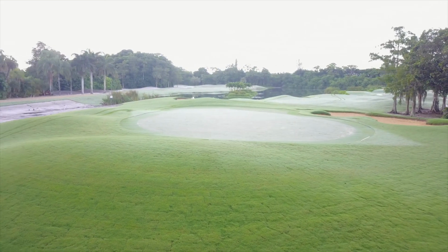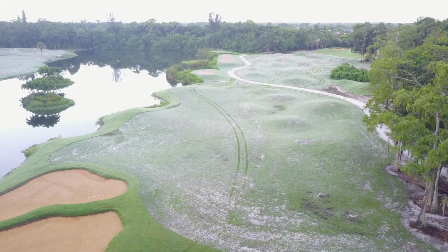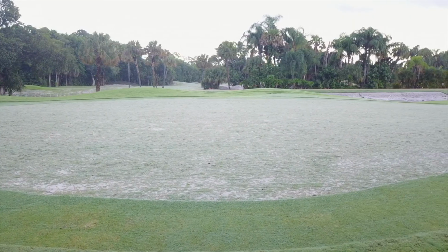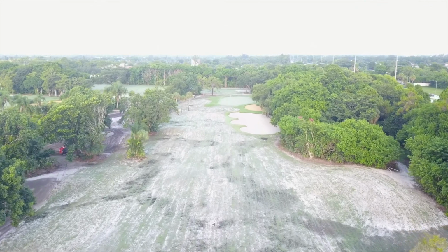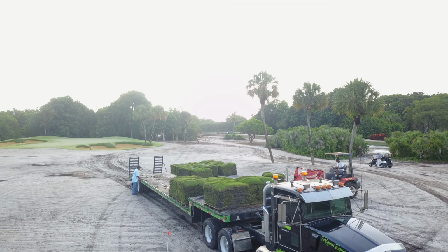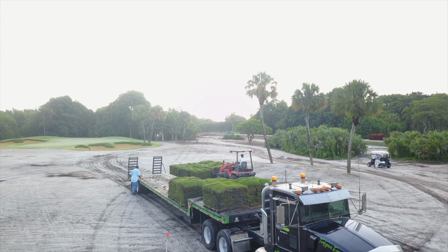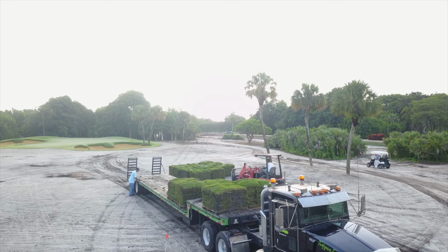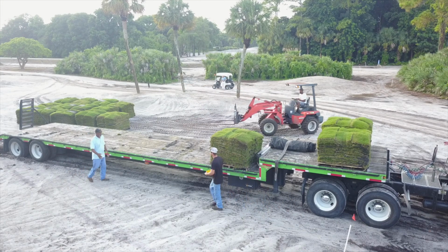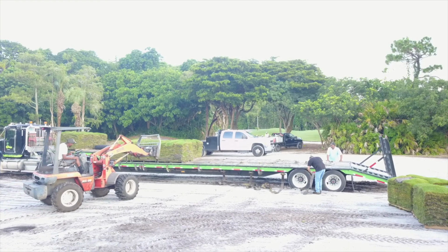This week we received a little over an inch of rain on Tuesday as the outer edges of Tropical Storm Emily passed just north of Boca Raton. Fortunately, work on our golf course renovation project was only delayed for a few hours as a result of this tropical storm. Unfortunately, the sod farm northwest of Lake Okeechobee supplying our sod received fairly heavy rains as a result of Emily, and we have been able to do only limited grass planting this week. With improved weather, we should be able to plant enough grass this weekend to get back on schedule.